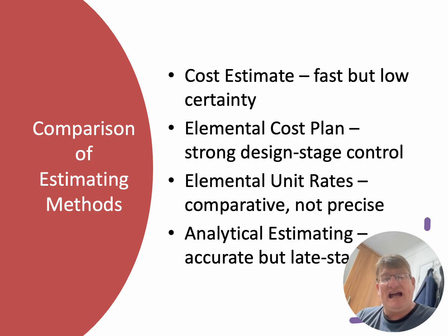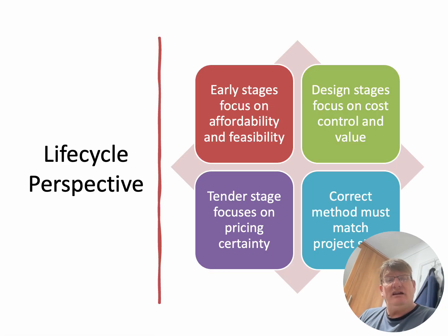With NRM2 and 3, analytical estimating, accurate, okay, but requires a lot more time, a lot more analysis, a lot more detail, okay? And fundamentally, that's why, if you like, the budgets change over time. That's why the budgets may not reflect the tender bids, okay? And you know, that's why there's issues, yeah? Okay? All right.